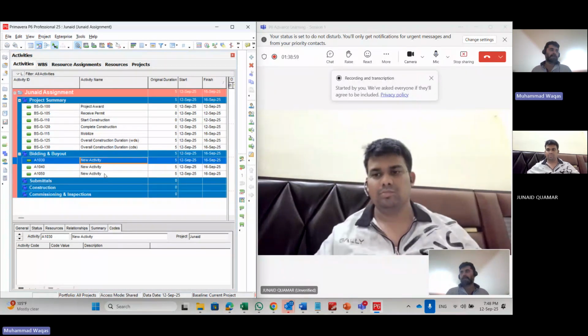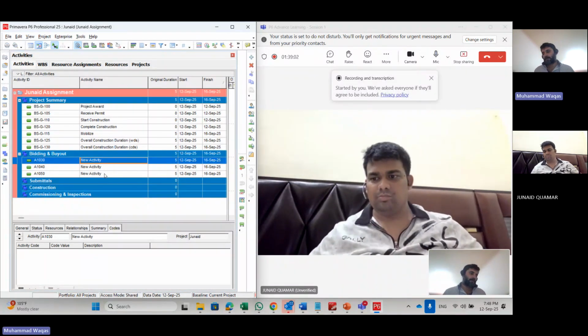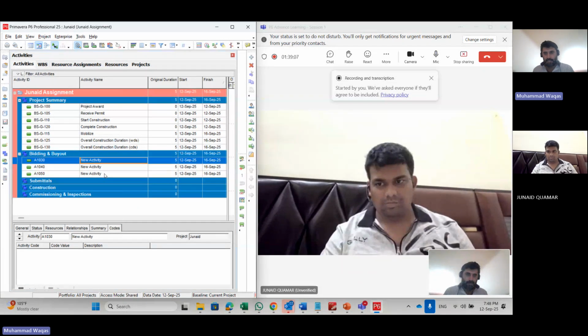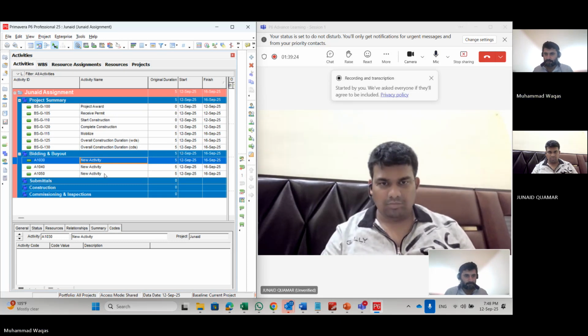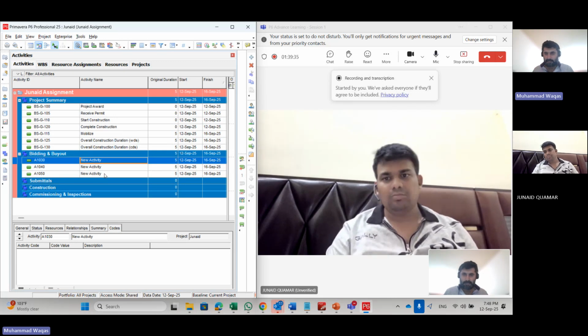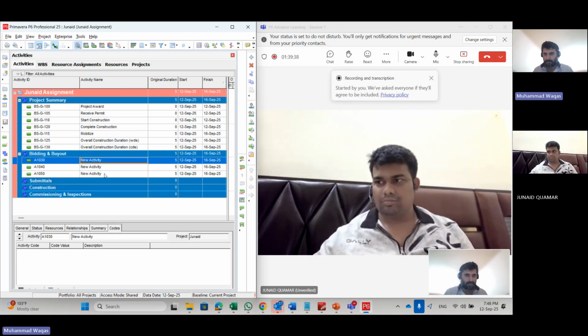Normally I am using ChatGPT a lot for different reasons, but normally we are doing only email corrections, how to write an email, but we can do more than that. We can check import export. We can upload the BOQ and ask it to give us the list of activities. We can put some productivity rates, and it will get us the manpower. Or it will give us the relationships: my friend, this is my schedule, can you please give me the relationships based on industry practices, etc.